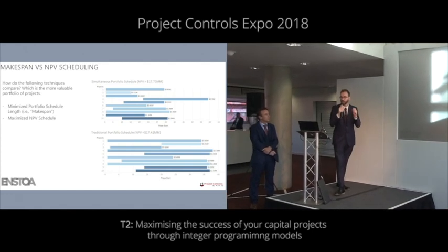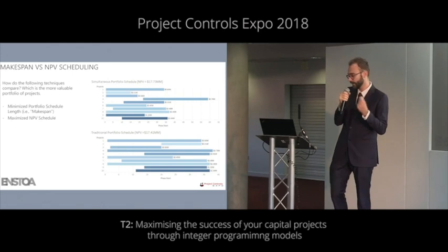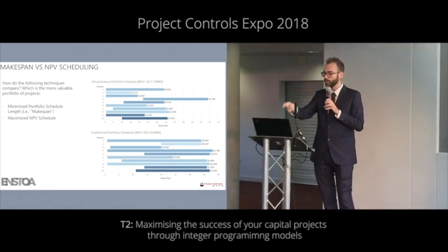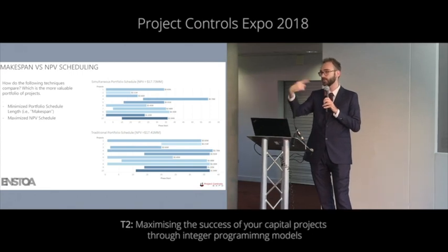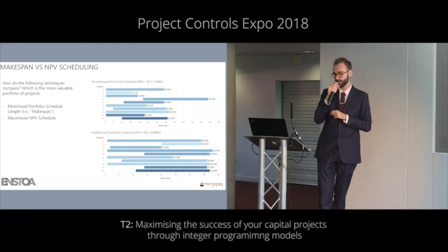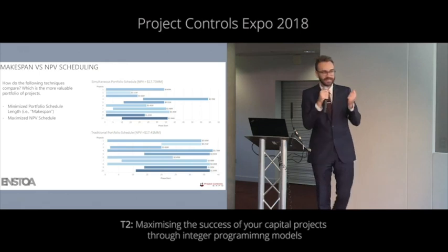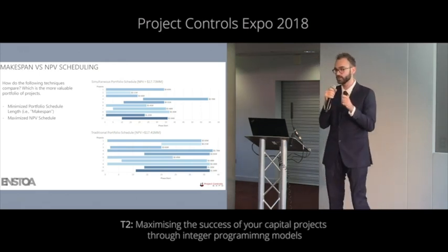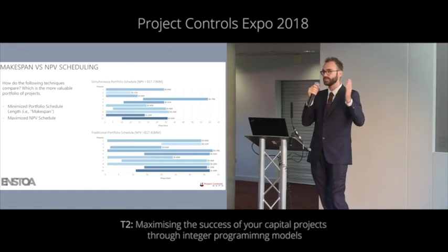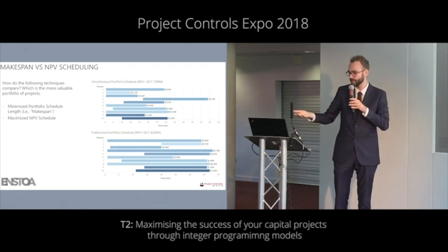Makespan does not consider that simultaneity in project scheduling and selection that I discussed earlier. Makespan only considers schedule. Because of that, when you eyeball these two plots, the first one is the one I showed in the previous slide, the second one is new, you'll see that their schedules are very, very different. And the makespan schedule, which sits at the bottom, is biased in favor of very large projects. So you'll notice that project 4 is very, very large. The makespan solver that wants to minimize schedule time is going to drive that one to start early so it finishes early, which stands to reason.